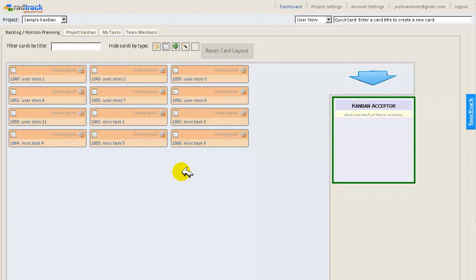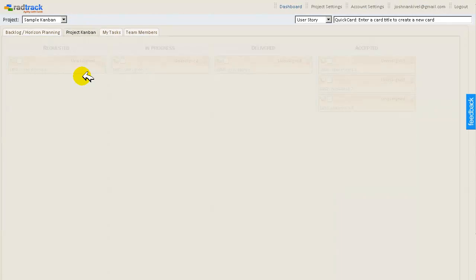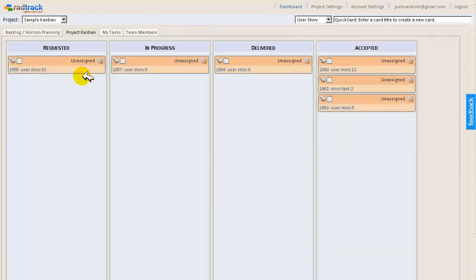The way that I do it on the physical board is the things towards the top right are the higher priority. And as you go down and to the left, you get lower and lower priority. So we can move the stickies around and negotiate in real time based on what the priority is. And the nice thing about this is that when you do get the drive-bys, it makes you stop and take a look at what's on the Kanban board. You go through the process of saying, is this urgent and important, or is it just urgent? Is it something that we can put in the backlog?